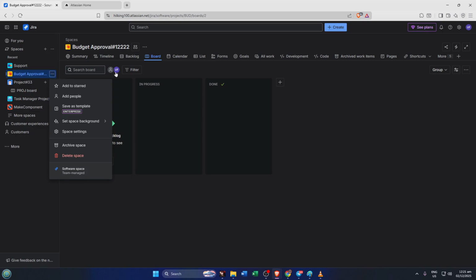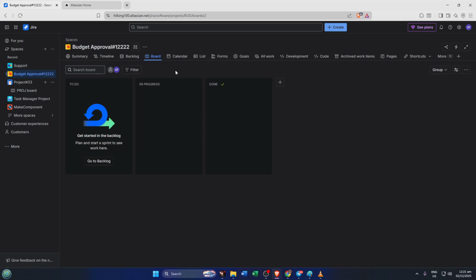First, go ahead and log into your Jira account and make sure you're selecting the correct Scrum project you want to analyze. One quick note here, velocity charts aren't available for Kanban boards by default. So if you're using Kanban, you might not see this option. Stick with a Scrum board which is designed around sprints and you'll have access to this feature.